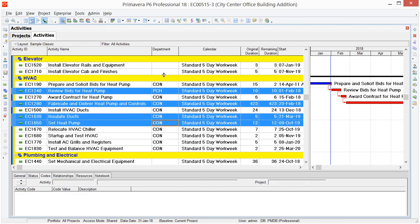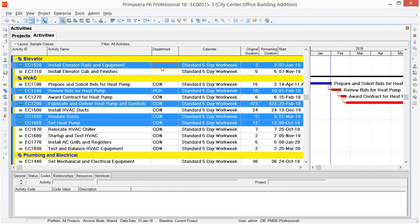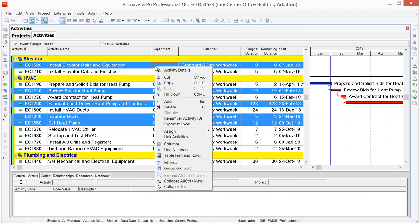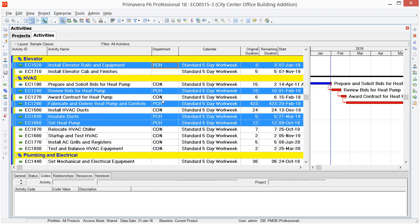You see here, I can even select activities above my highlighted option initially. And so again, I stop at the field in the column for the activity code on my last activity for which I want that value to be copied into. Now if I right-mouse click, I can choose Fill Down. And now I've just assigned those activities the Purchasing Department code.